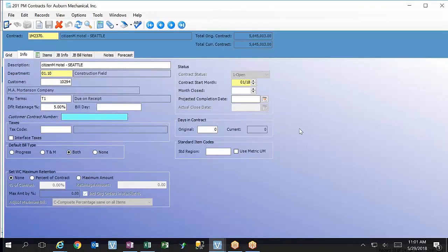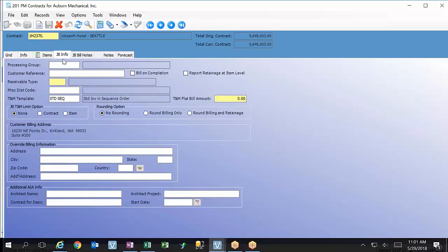I mean, you can put it, that's fine. I'm just saying, you do have the customer contract number, because most of the time when we get information from the client via email, collections, subcontract, change order, they reference their number. They don't reference ours. And there are a lot of times that we're trying to look up information and nowhere on what they've sent us tells us who they are, or what job it is, and we have to cross-reference it back to our number. So we utilize that information a lot in our system.